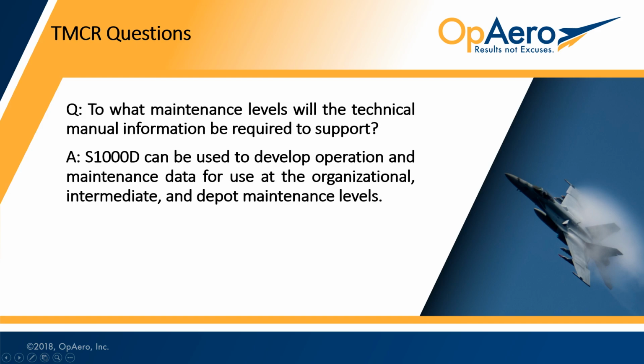All right. In addition, of course, the next question: to what maintenance level will the technical manual support or the information be required to support? So are we writing it for an organizational level maintenance manual, an intermediate, or a depot maintenance level manual? You've got to lay that into the TMCR and be real specific about what level of maintenance you want your team to write to.